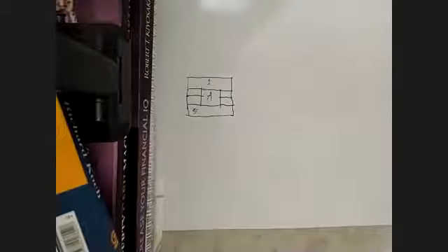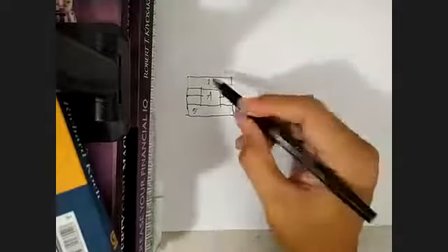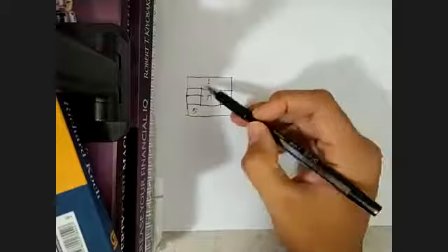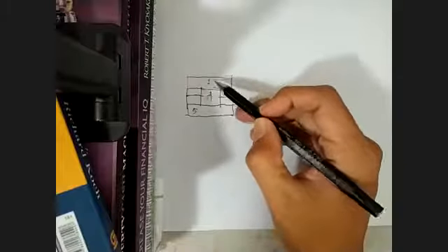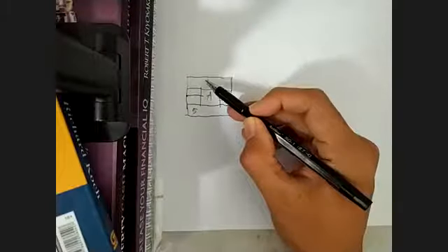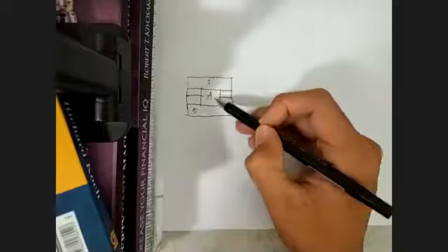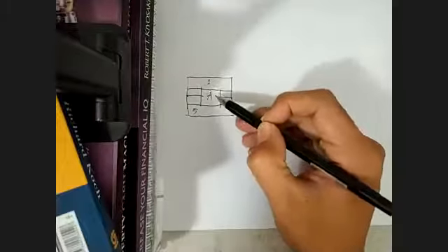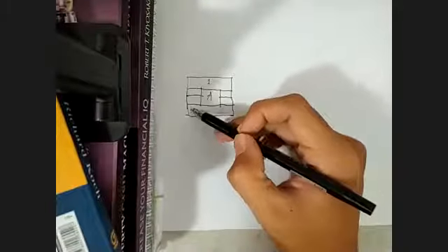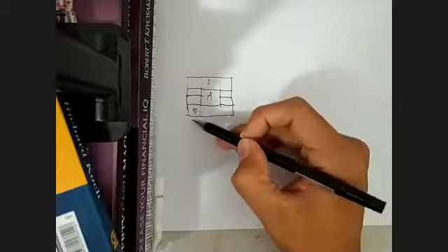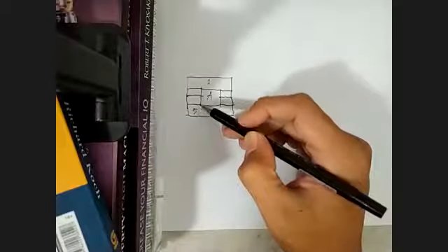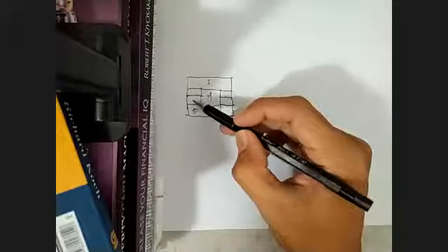Okay, well, guys, we will answer the question from PowerPoint. The first step that we have to do when doing the calculation for duration in PDM is to draw the square like this that contains the box like this. The first column we fill with the number of the activity, and we write down the name of the activity and the duration of the activities. Okay. Like my explanation before, we have 4 columns over here.